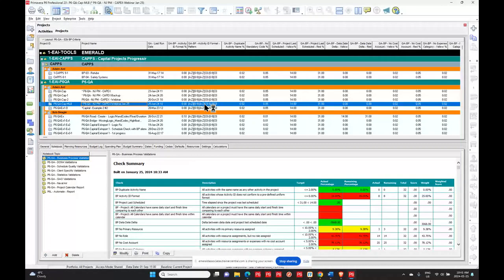This check is very helpful on some schedules, all schedules, but some more than others, because I've worked on contracts where the way the schedule was set up, your activity ID, the way it's broken down, would tell what report it needed to go on at the end of the month. If that activity ID was not correct, you got problems. That report is not correct. So this would allow you to check it very, very easily.